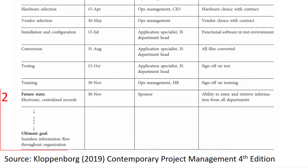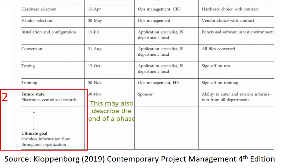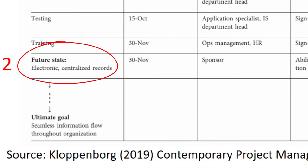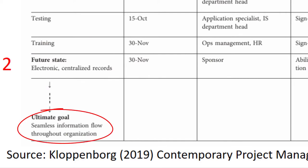Second, go to the last row and describe the project at its successful completion. This is the ideal future state that will deliver the project benefits. This may be a specific outcome or it could describe the end of a phase depending on the type of project, and should be very short. Using our examples: there are electronic centralised records, flowing down to an ultimate goal focused on better performance — such as seamless information flow throughout the organisation.